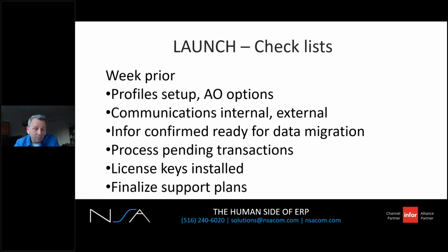Week prior to the launch, communications, let's say internal. So emails to your staff and everybody who's involved, the end users, about what to expect on the Monday morning. So you're going to work all weekend preparing everything. Assuming all goes well, Monday morning, they're launching, your end user needs to work. So what to expect on the Monday morning, who to contact for support. Let them know if the old system's going to be down, let them know their logins aren't going to work.